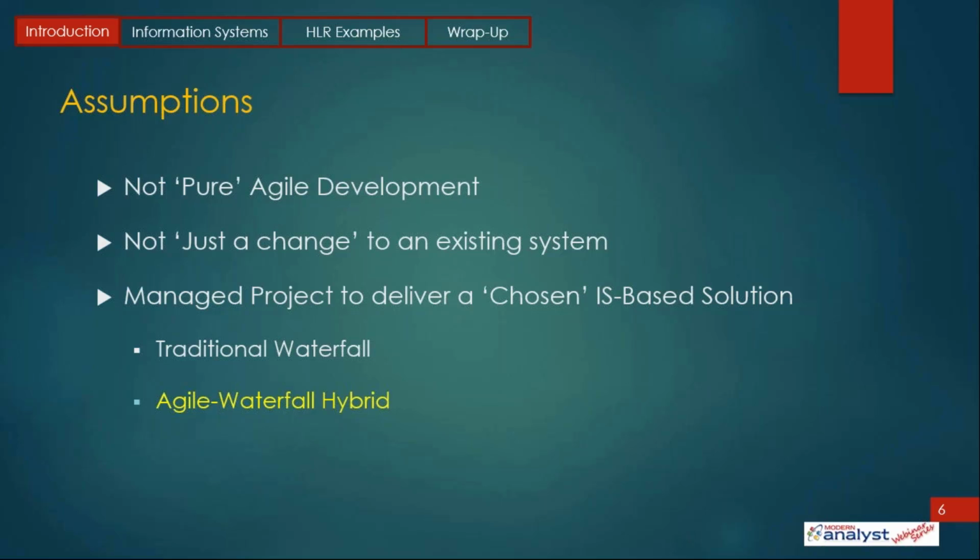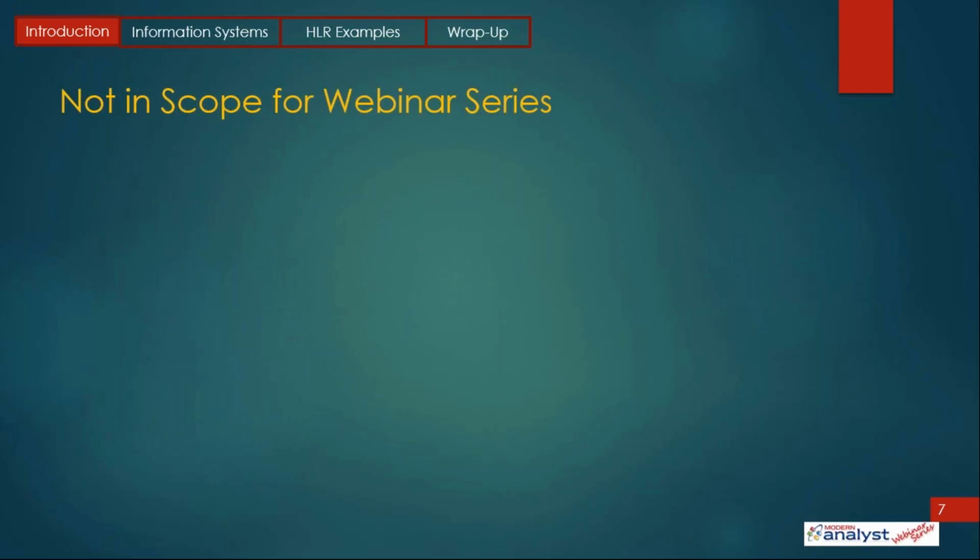So the developers are organized into Scrum teams. The BA typically is given the role of pseudo product owner. And what that BA is doing is taking the requirements they've been given and talking to the team, walking them through those refinements. But in both of these cases, we typically have both high-level and detailed business requirements before we break into the hybrid mode.